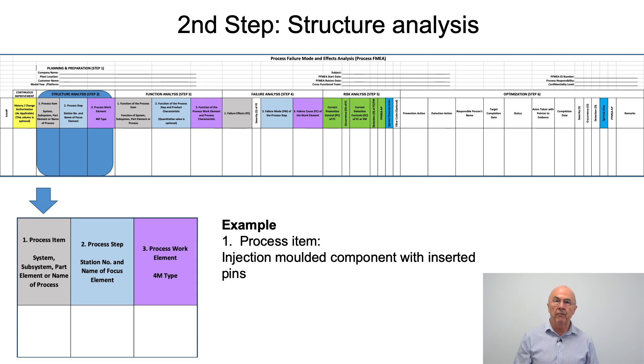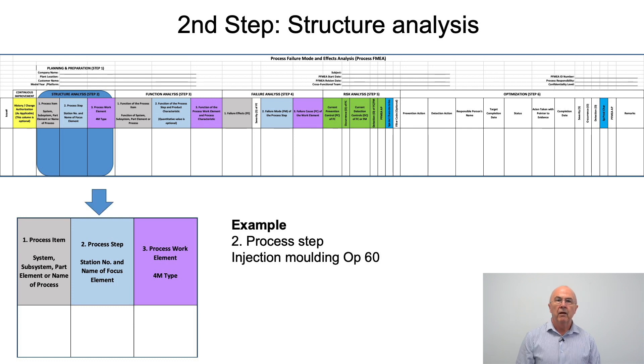This is a saleable product in this case that we are going to supply to GM because within our factory after the product is molded we are not going to do any other assembly activity. The next box is the process step. The team have decided here that the focus of the analysis for this part of the FMEA is going to be injection molding operation 60.